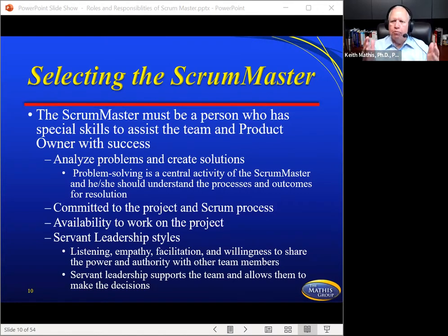Well, the most central piece of information on this is communication, and it's accountability. Now, many people don't think about the accountability piece. The communication piece is, here's what I did yesterday, here's what I'm working on today, and here's where I had some impediments or roadblocks. And so you're able to talk about it very briefly. Now, you want to make sure it's only 15 minutes so that you can then turn around and get back to work.